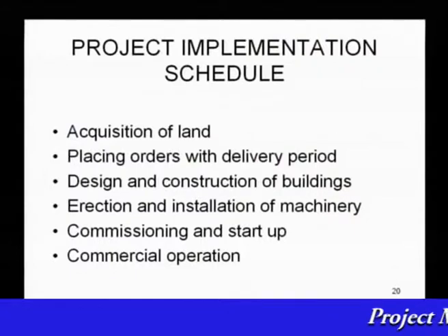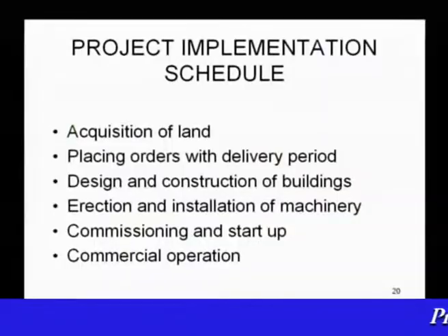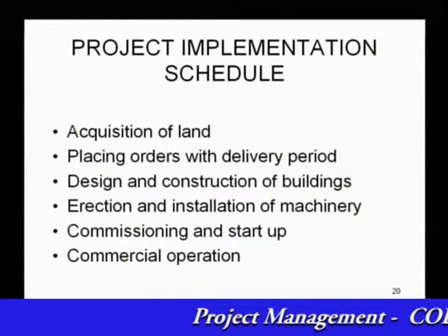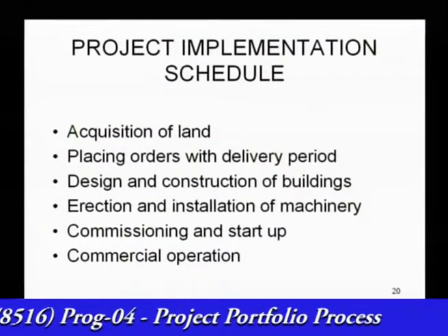For each phase, erection and installation of machinery. This may also involve imports, which in turn means opening letter of credit and government import regulations, licenses and permits. Commissioning startup requires people to be trained and be in position. Commercial operations require lining up cash flows and working capital.